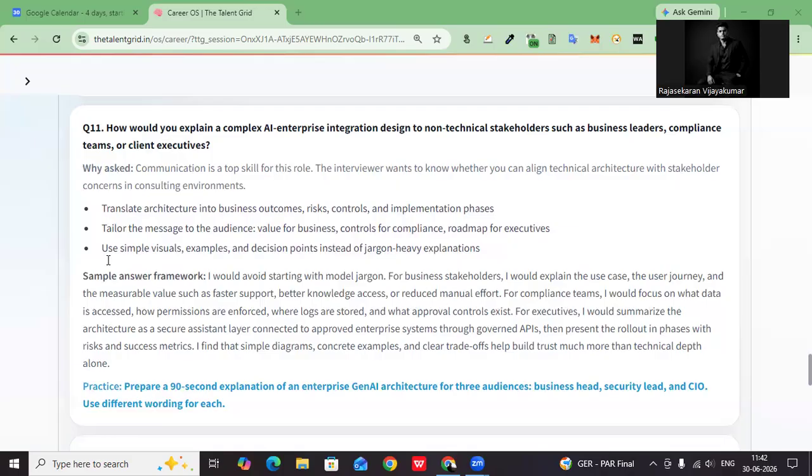If we have to do the end-to-end POC and feasibility check, I will make sure the responsible person for the POC is the architect or technical person who is going to do the POC, and accountable is the business analyst.